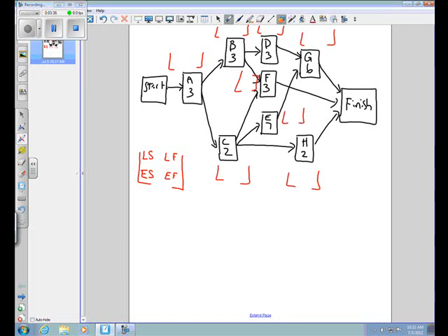What I'm going to do, and what you'll want to do, is start at the far left. Start with activity A. And we're going to work from left to right, and determine the earliest start and the earliest finish for every single activity on here. And then we're going to work backwards, and figure out the latest start and latest finish for each activity. So activity A has no activities that precede it. So I don't need to complete anything before I get started on activity A. Another way of saying that is the earliest we could start is right now, or time 0.